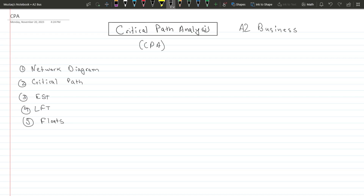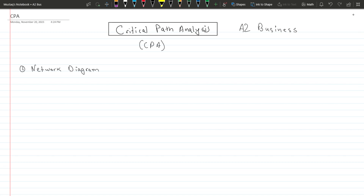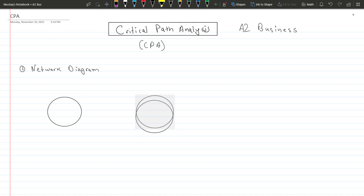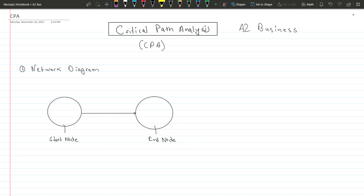I hope to make you guys clear about the appropriate approach for this kind of question. So let's start with the network diagram first. When drawing a network diagram, there are circles called nodes. We have two nodes for one activity — a starting node and an end node. The start node is when an activity starts, and the end node is when an activity ends.